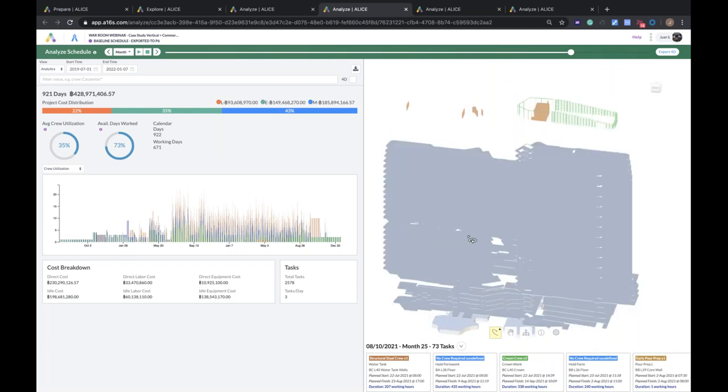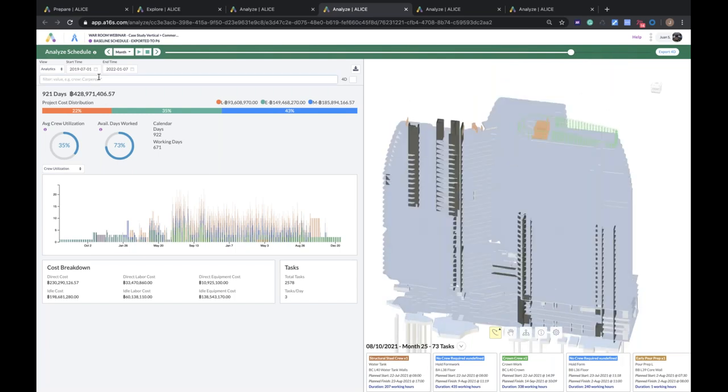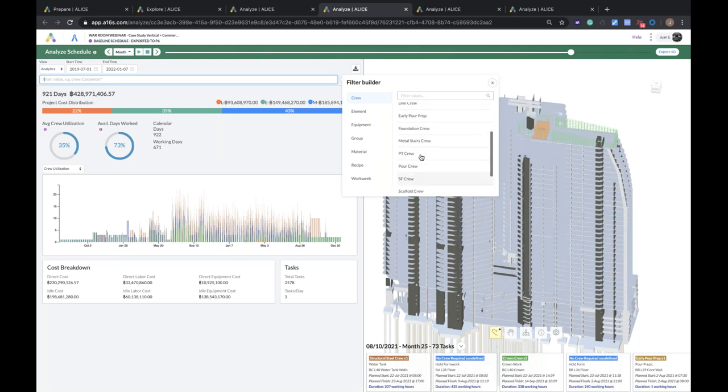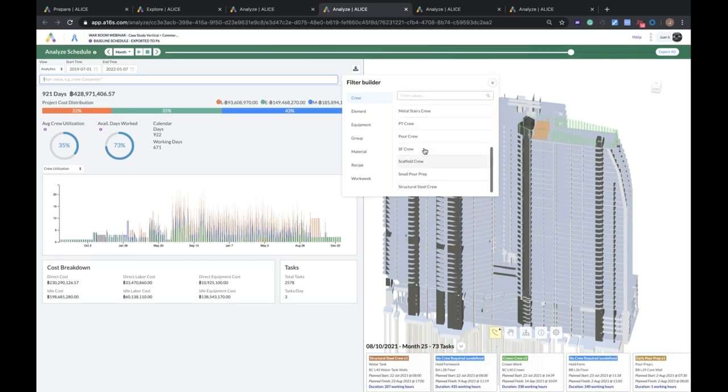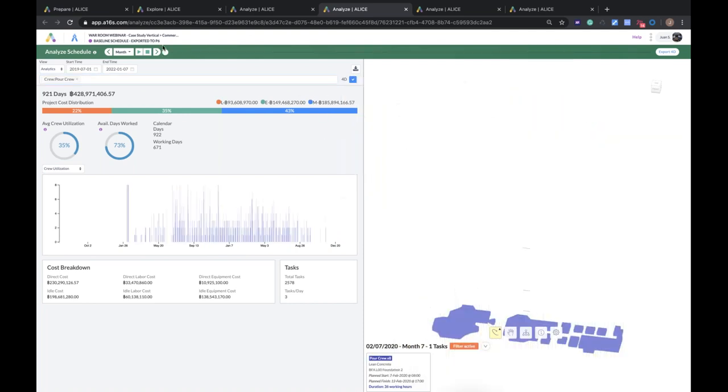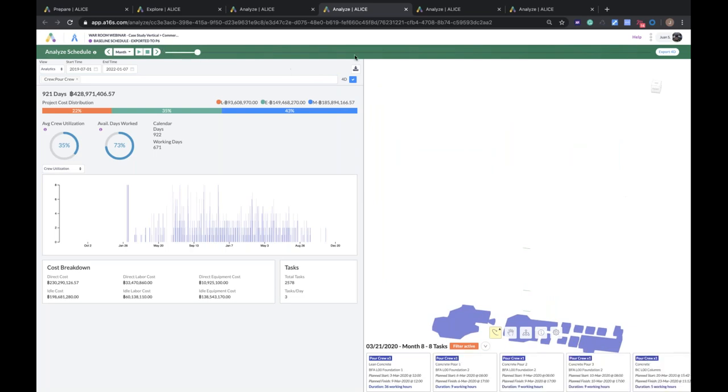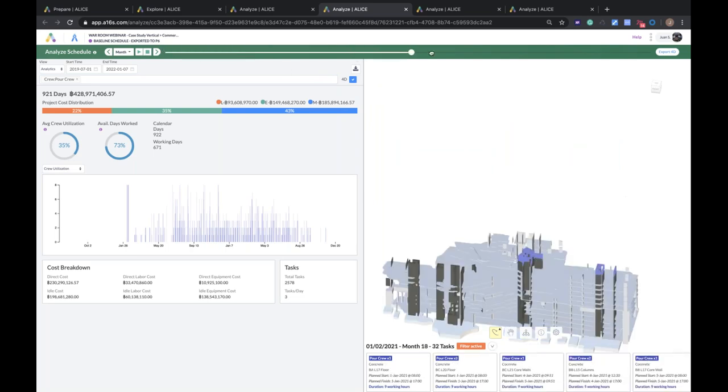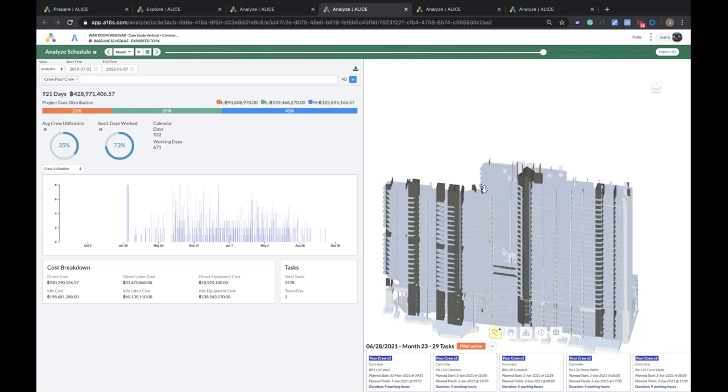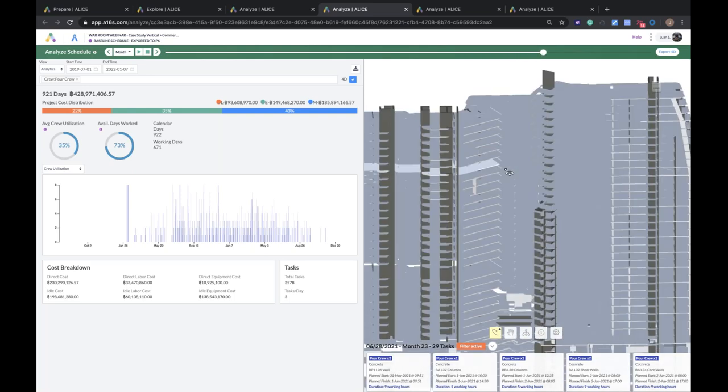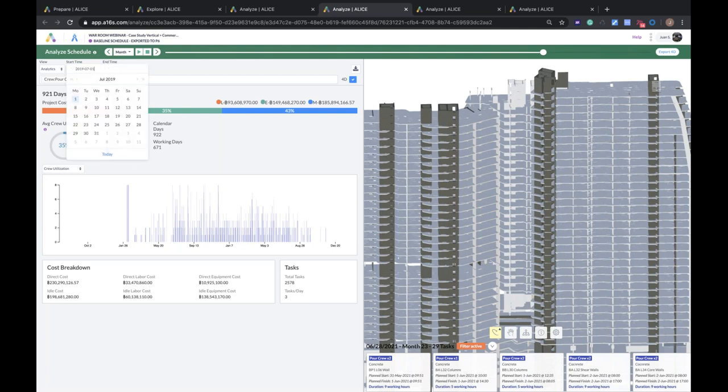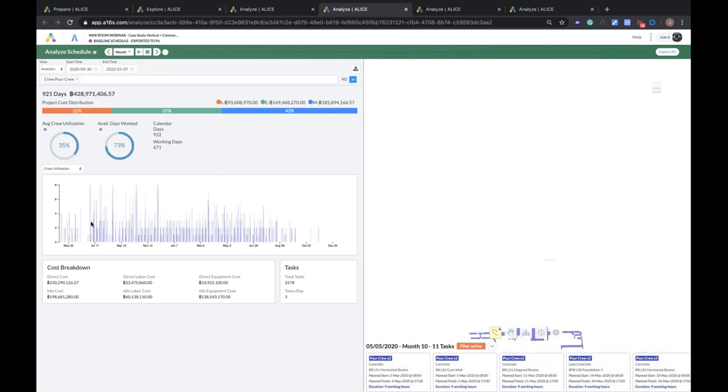So here is the analyzer in ALICE. We've got the simulation of the assembly process, which you can look at by day, week, or month. One key thing to note is that you only give ALICE one date, your start date, or your as-built date. And then ALICE actually assigns all of the other dates and durations based on your plan that you created. Now, I can also filter this and say I only want to look at my pour crew. And I can filter the 4D. And now I'm just looking at the pour crew activities in the task card and in the 4D.